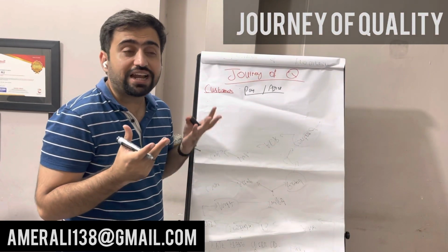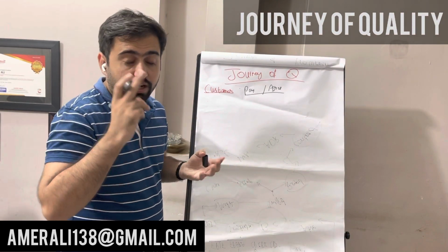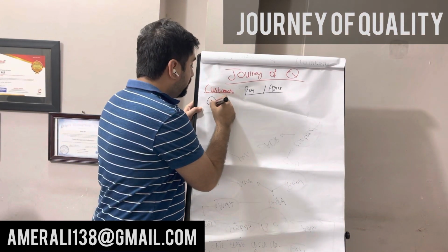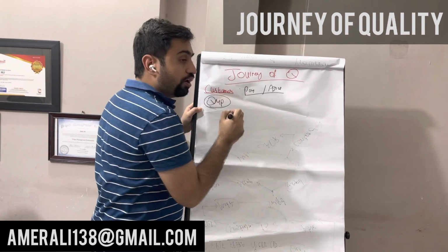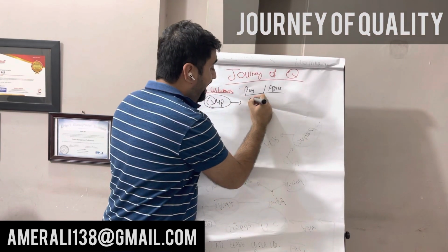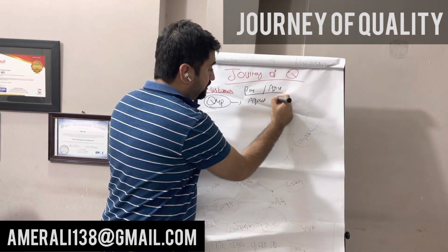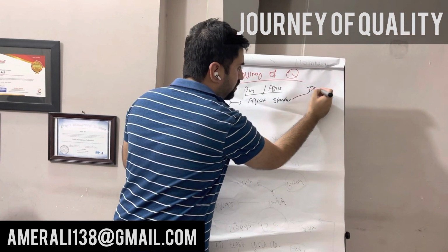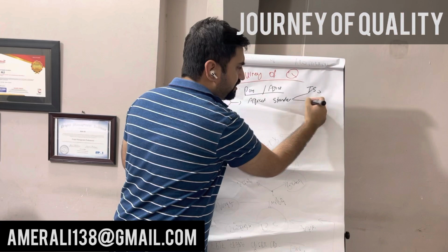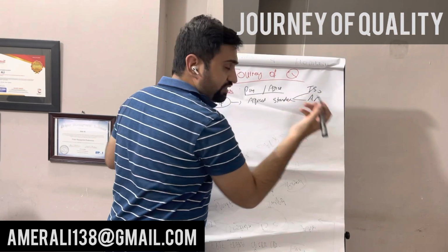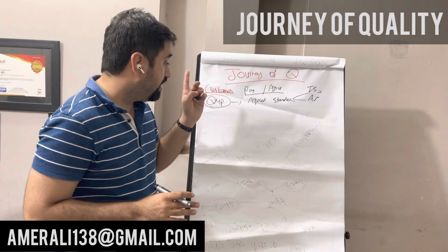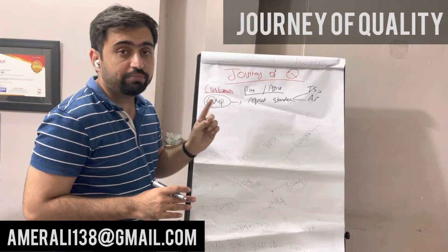So what are the standards that we agree on the quality? A very important question to understand. So we make a quality management plan. Quality management plans have agreed standards. Agreed standards can be ISOs. Customers can have their own standards, ANSI, whatever the standards. You have to agree with the customer and put it into the quality management plan.